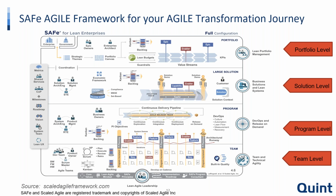And then we are also talking about another separate entity, because the larger the number of teams, it becomes very important to ensure that we are adhering to the architecture, and at the same time taking care of system integration, which is very critical, because when multiple increments or packages are being delivered as part of Agile, this is where we talk about a community of practice, which we call the system and architectural engineering team. Whilst the teams are delivering these iterations and their respective increments, these are getting consolidated and integrated, and you are constantly performing a system demo.